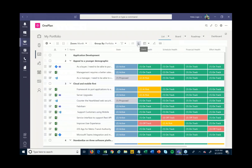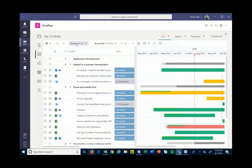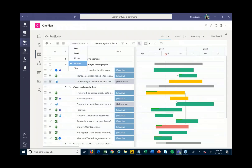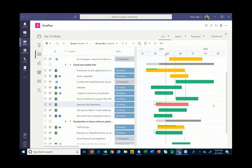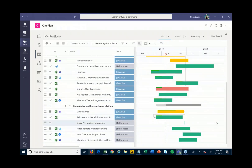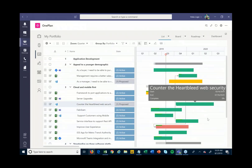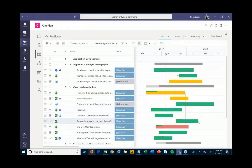From within here I can also pop open my Gantt or timeline view so I can see when all these projects are happening. You can also create dependencies between them — you'll see lines here showing dependencies where, for example, as this project slips that's also going to make another project slip, or this project can't start until this one starts — whether those projects are managed in a waterfall, Agile, or other way.